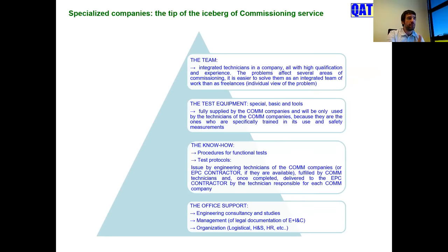So you have the team, not only freelance, integrated technicians in a company, all with a high work qualification and experience, working together to solve all the problems, because the problems are very, very connected to each other. You have to solve a problem with the wiring, but the wiring is connected to the motor, and the motor starts a pump, and the motor must turn a pump in one direction or another direction. So it's very important to think about it, because the construction connects this motor in the same way always, but not in the way that this pump must work.